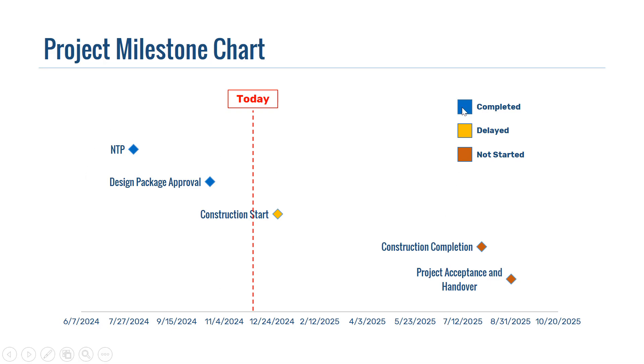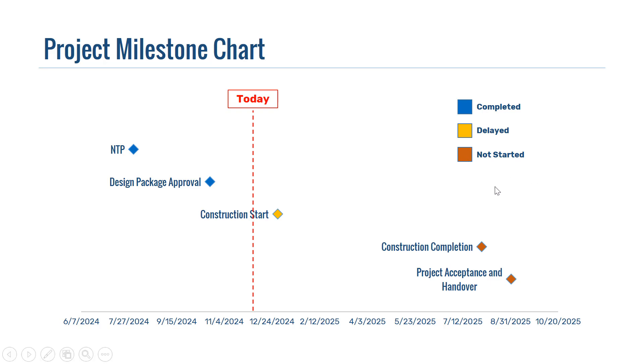On the top here, we have the legends for all these colors. For example, the blue ones indicate that these milestones are completed, while the yellow one indicates that this one is delayed, while the one with this reddish color indicates that the milestone hasn't been started yet.